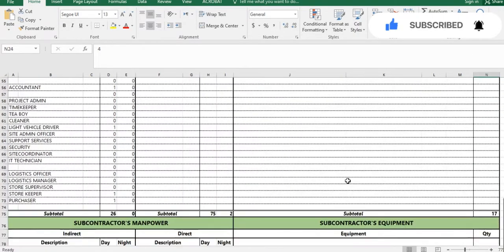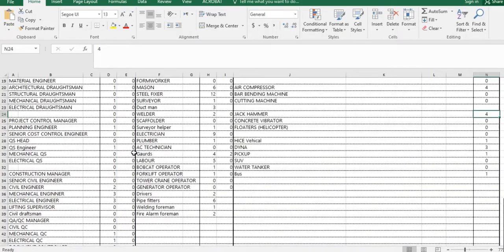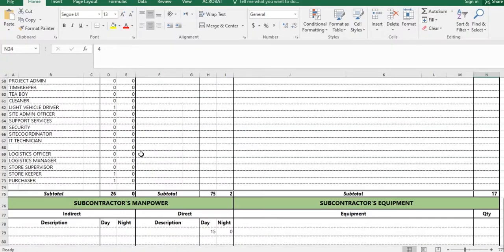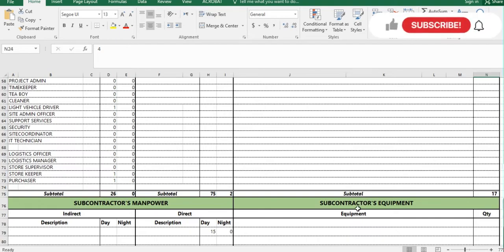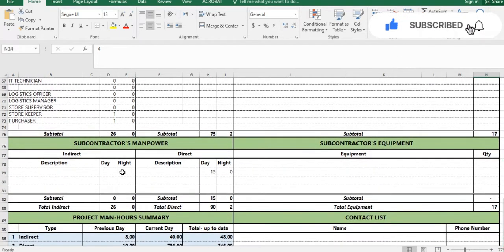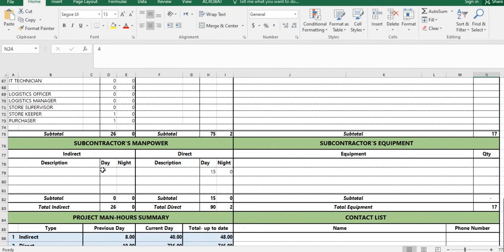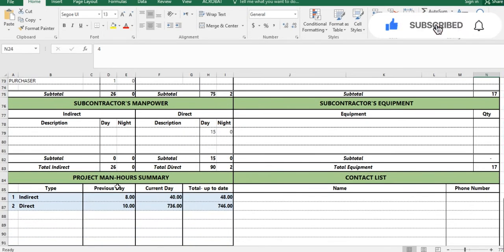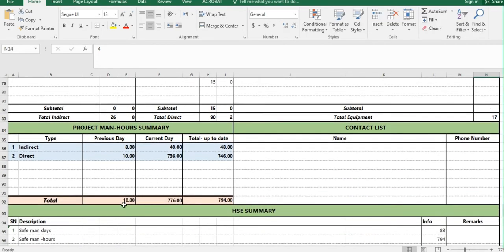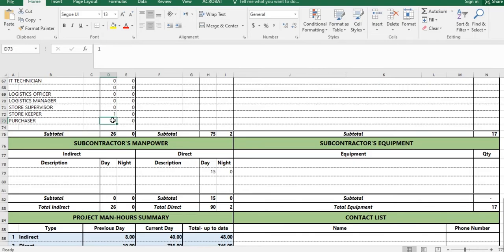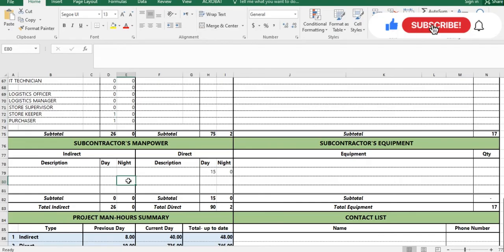Whatever data you put here will feed into the summary. The subcontractor equipment and manpower section is for any subcontractor working at site — you put their data here, including day shift, night shift, and any equipment they use. The project manpower summary section is calculated automatically by Excel formula from your company and subcontractor manpower sections.